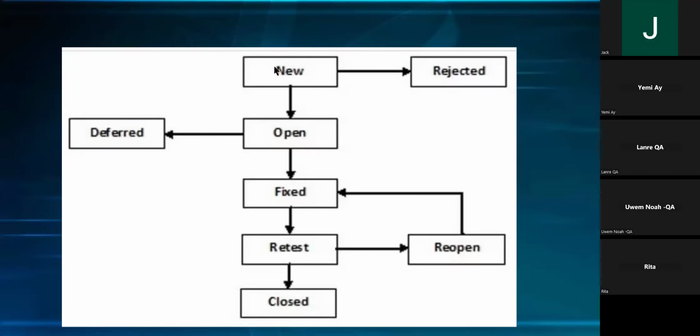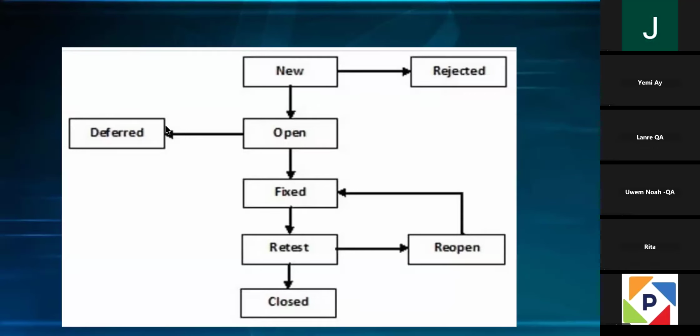Also, you can raise a defect, then they look at it. Okay, yes, it's a likely defect. It's opened. Now, we look at it in rating. We triage it. We call it defect triage, where you discuss it. How do we want to resolve it? Is this one going to take time? If they feel that it's going to take time and it's not needed in this phase, they can actually move it and defer it and say, okay, we will fix it in the next phase. We'll start working on it once this one is deferred. That's another phase: deferred.